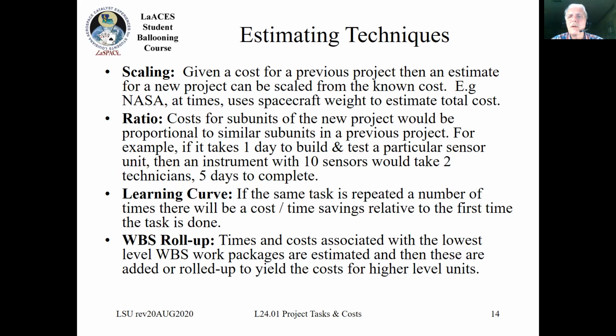For example, NASA is notorious for using spacecraft weight to estimate the total cost. So they basically say, okay, how much does a spacecraft weigh? All right, well, when I put in this particular factor, then that's what the estimated cost would be. Sometimes that works, sometimes that won't.